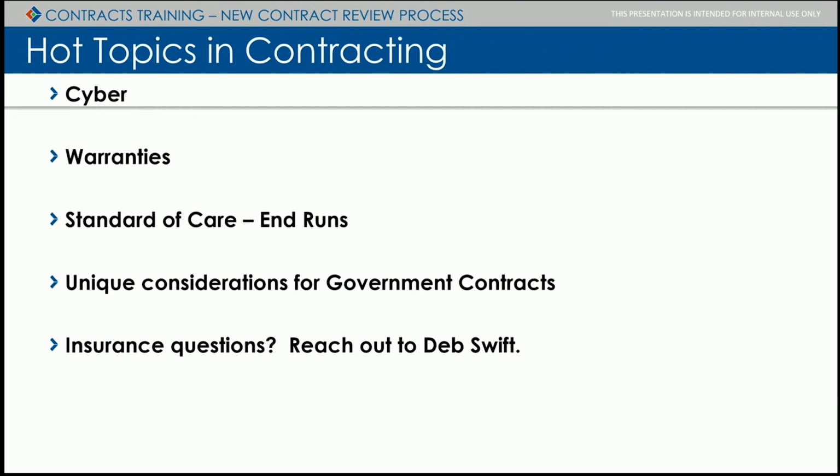I do want to mention this: I've been getting requests for project-specific policies. That is possible, but what I'll tell you is they're extremely expensive, about $50,000 to $75,000 annually. But keep in mind that you have to have that coverage in place for the full term of the statute of limitations, because it's a claims-based policy.